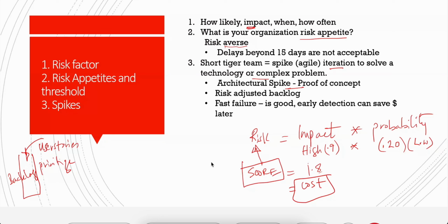In the predictive or waterfall, you take the WBS, you decompose into its respective tasks, and then you do the risk analysis. Decompose, risk analysis. Decompose, risk analysis. So the word decompose is important to keep in the back of your mind. We can bring it up when we do the scheduling chapter next.